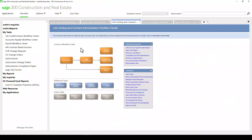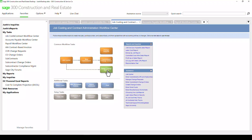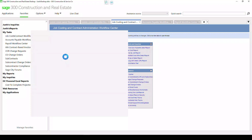A typical workflow would be setting up a job, putting in budget and schedule values, writing commitments — which are POs and subcontracts — the ability to input change requests, turn those into change orders, as well as owner change orders and commitment change orders, all right here. So I'm going to pull up Job Central here and show a job setup wizard.